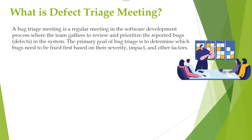Critical bugs that impact the core functionality of the system are usually given the highest priority. Once prioritization is completed, the bugs are assigned to developers for resolution. Bug triage meetings are crucial for ensuring that the most critical issues are addressed promptly, and they also help in maintaining the quality and stability of the software being developed.